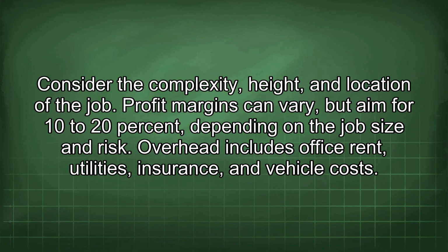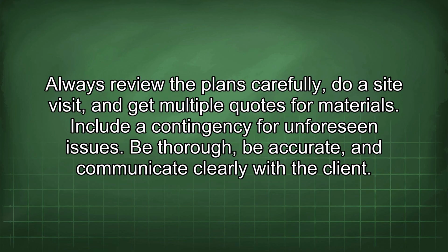Profit margins can vary, but aim for 10 to 20% depending on the job size and risk. Overhead includes office rent, utilities, insurance, and vehicle costs. Always review the plans carefully, do a site visit, and get multiple quotes for materials. Include a contingency for unforeseen issues. Be thorough, be accurate, and communicate clearly with the client.